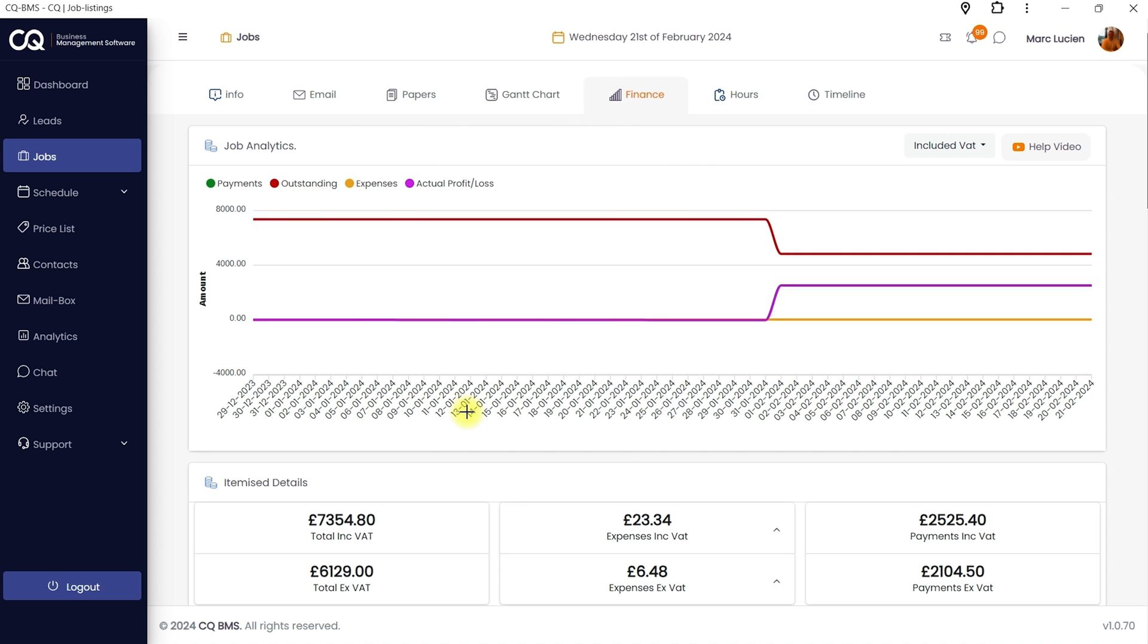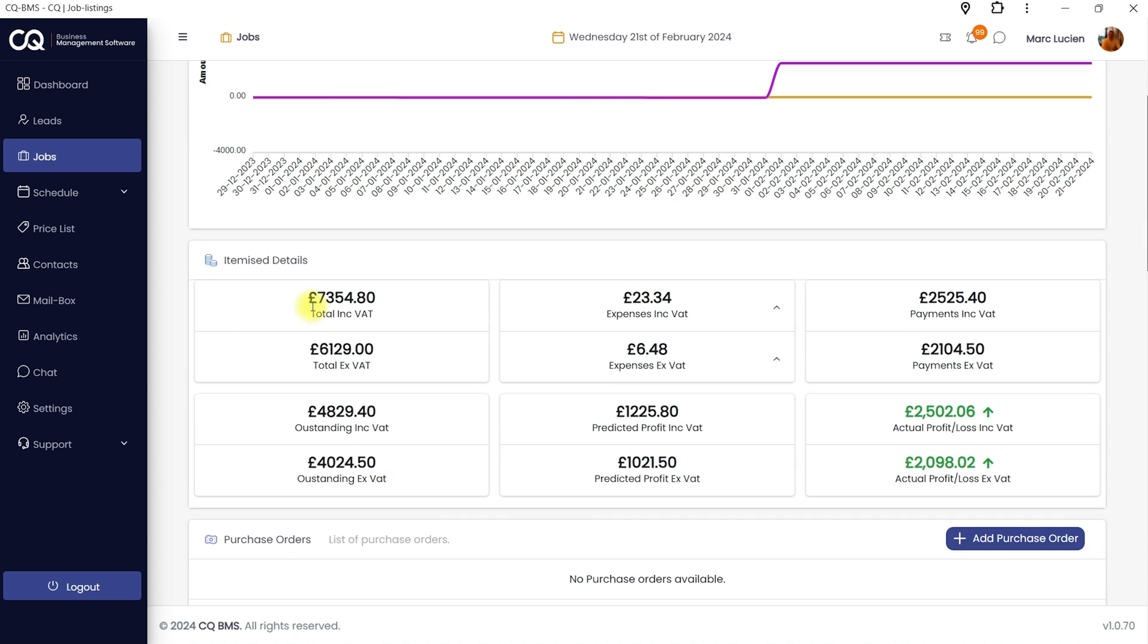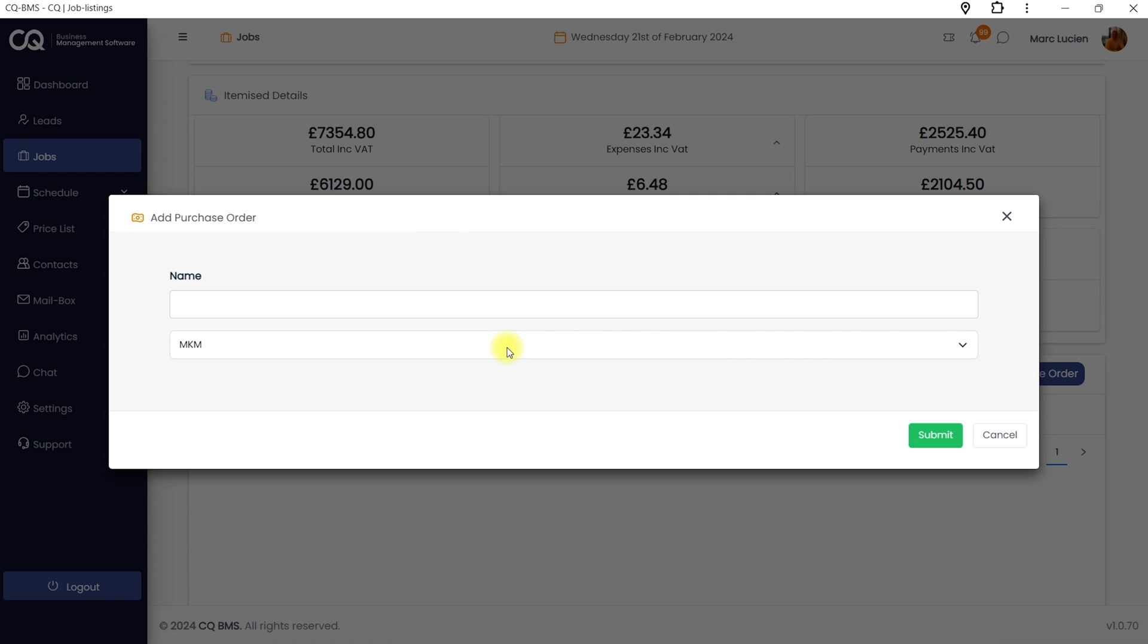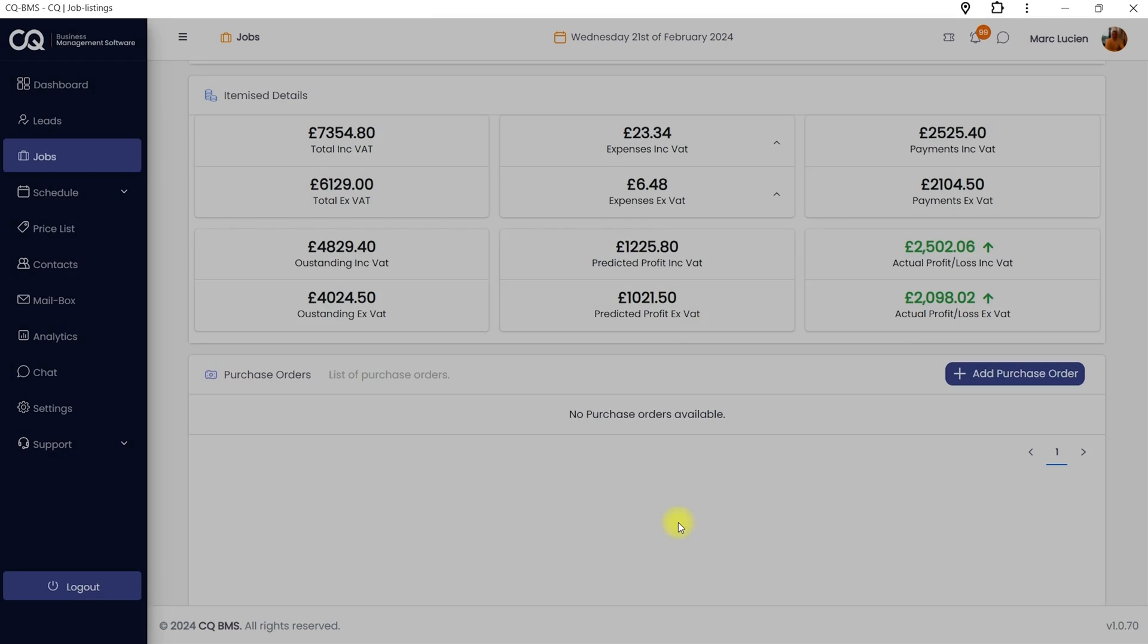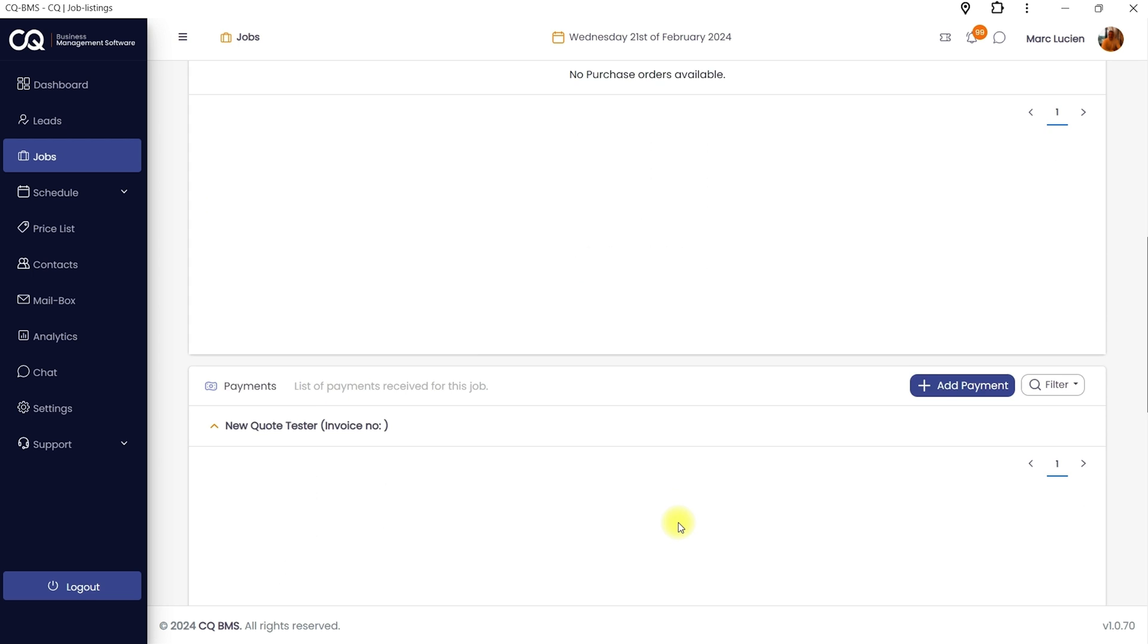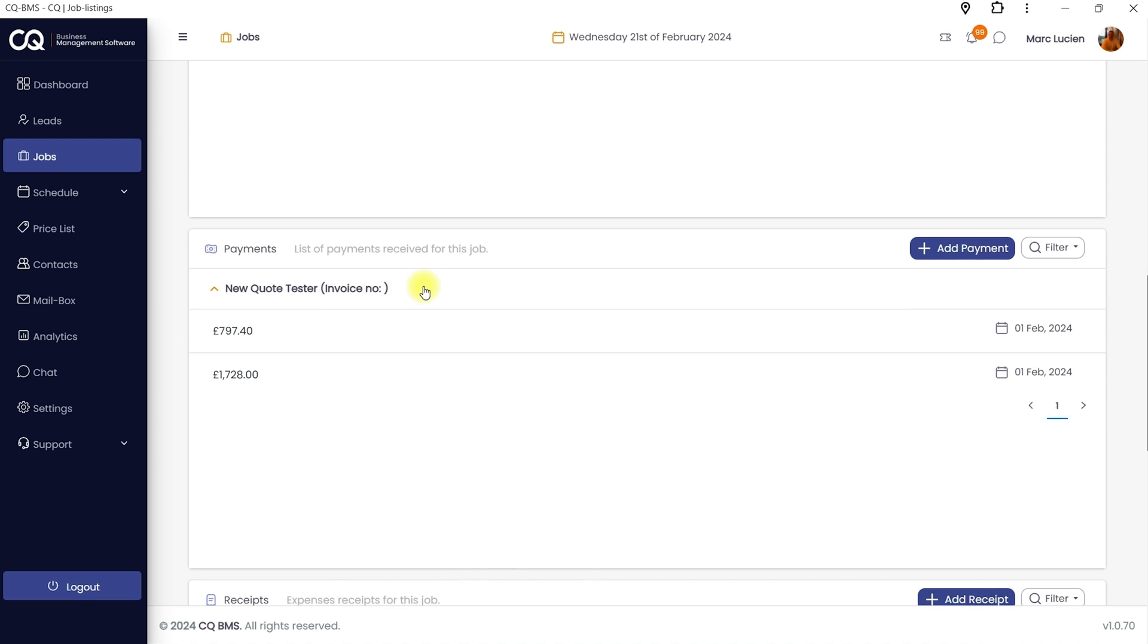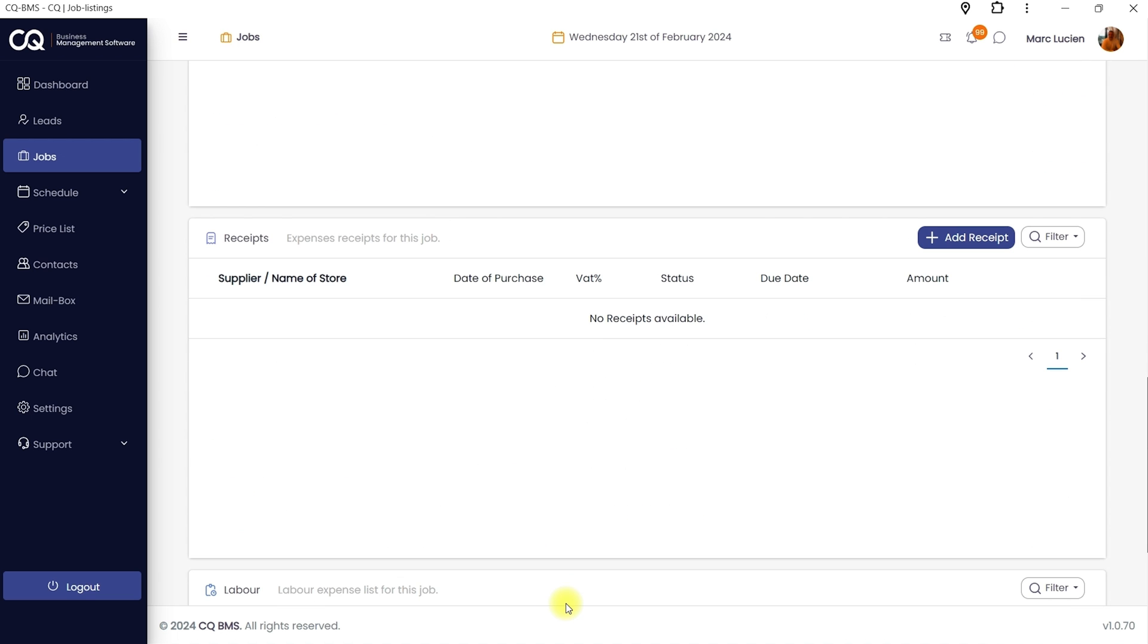Track profit and loss for each job in the finance section. Add purchase orders, suppliers, payments received, project receipts, and labor costs, and let this platform do the math for you.